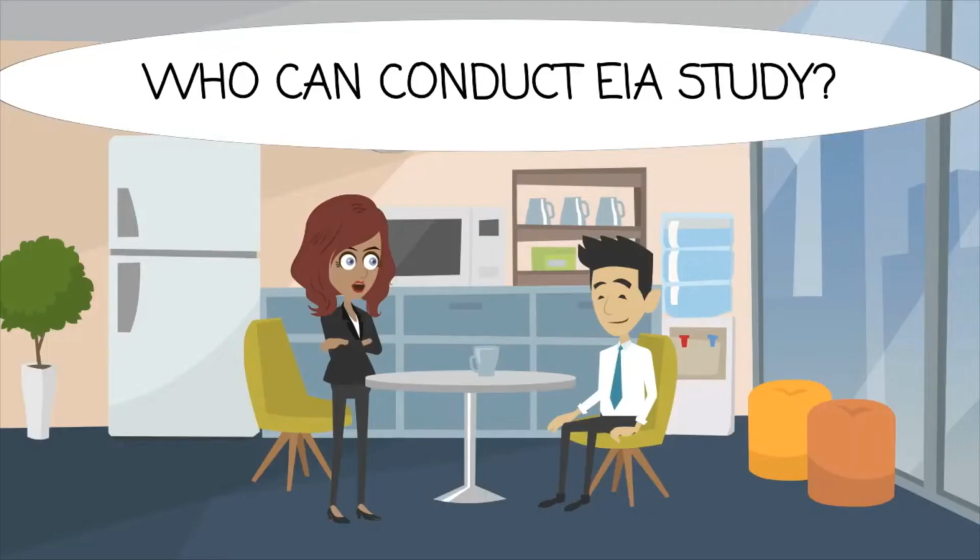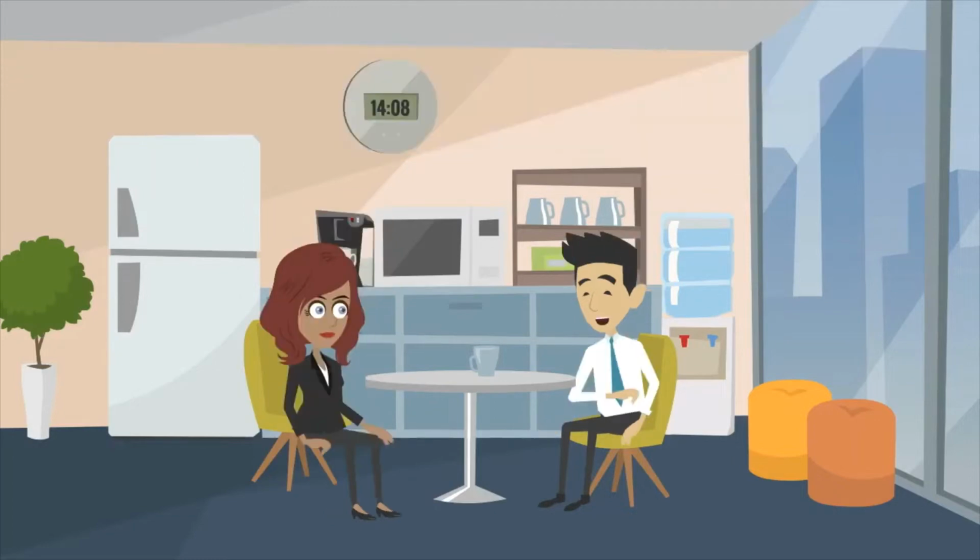May I know who can conduct the EIA study? It has to be conducted by competent individuals who are registered with the Department of Environment, DOE, under the EIA Consultant Registration Scheme. EIA reports will be rejected by DOE if conducted by individuals not registered with the department. Furthermore, the EIA study team leader has to ensure all members in the EIA study team are registered with DOE.